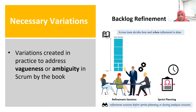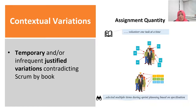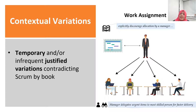Next, we have contextual variations. These are temporary or infrequent justified variations that contradict Scrum by the Book. The Guide does not prescribe how many items should be assigned to individuals, but primarily states volunteering one task at a time. In practice, we observed that multiple items were selected during sprint planning meetings based on individual expertise, preferences, or specializations. A second example is work assignment — both the Guide and Primer explicitly discourage allocation by a manager. In practice, the manager delegates urgent high-priority tasks to the most skillful person in the team for faster delivery, as a norm.